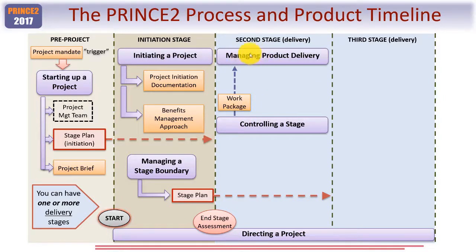Now the team here, usually a team manager, if not the team members themselves, need to agree that they understand the work package and they can carry out the work within the constraints laid down. By constraints, things like time, cost, if it's appropriate, tolerance, and so on. Now the team, once they've agreed, a handshake if you will, between the project manager and the team manager or the team themselves, once they've agreed to start work, then work can now be started.